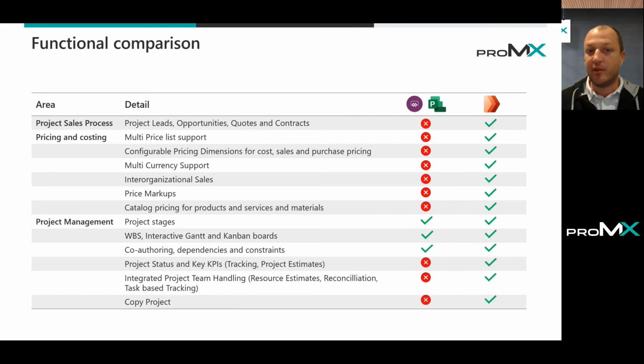Even if, for example, we planned a specific resource in the beginning and now this resource is not available and, instead of a consultant, we need to staff a senior consultant. From a customer perspective, this is not a change which is related to customer needs. This is a change related to our own organization, which means we cannot charge more to the customer, but we have much higher costs in our project, and this needs to be handled.